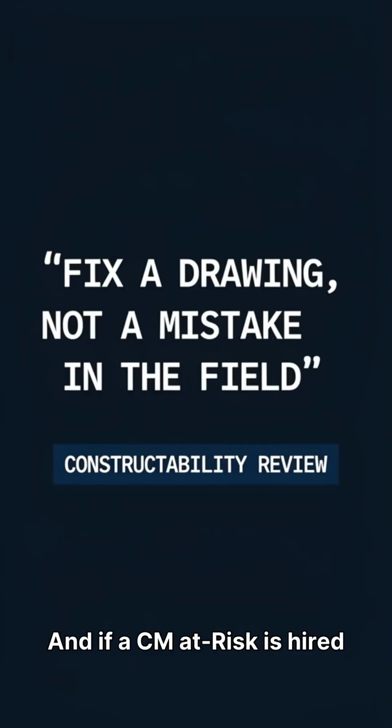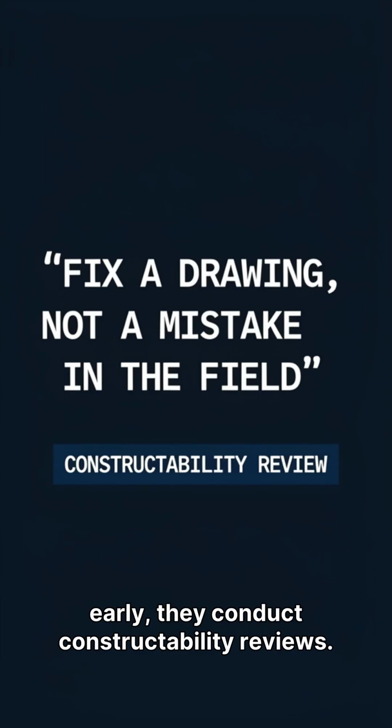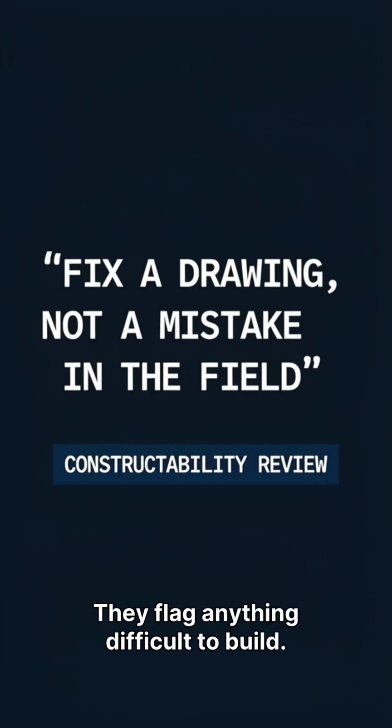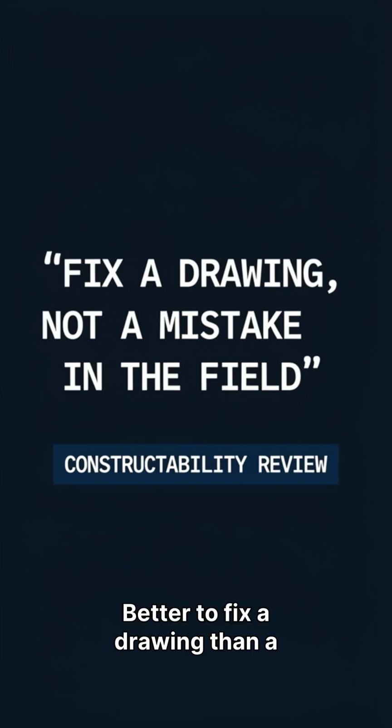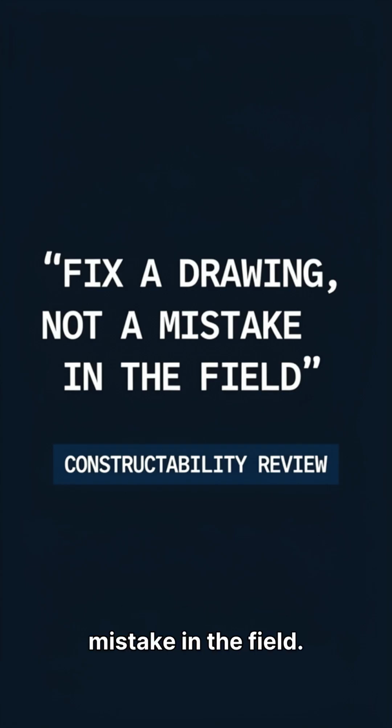And if a CM at risk is hired early, they conduct constructability reviews. They flag anything difficult to build. Better to fix a drawing than a mistake in the field.